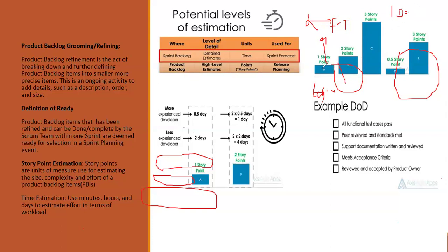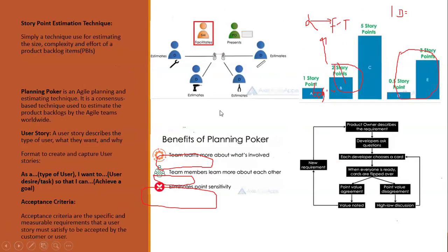So the reason why we are doing story points is to size user stories only. User story, not the tasks that you have broken down in the sprint backlog. During the practical session, maybe the next session we're going to have, I will explain this better in a practical way so that you see how this works. This time estimate is what you use to determine the workload of the individual team, the developers in your team. They are not the same thing. They are two different things entirely. Even if you check your Jira, you will see where they wrote it there.